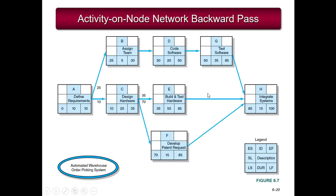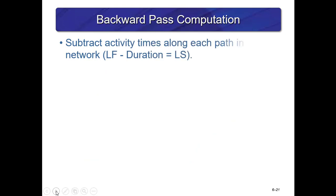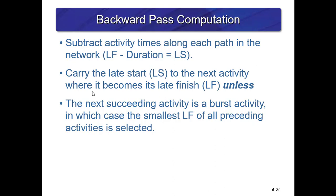The backward pass: hiding the early start and early finish data, when we reach the end of the project we have 100 days or units, and we go backwards subtracting durations along each path until we get back to our early finish of 10. Late finish minus duration equals late start. You carry the late start to the next activity going left, where it becomes the late finish of the preceding activity — unless the next activity is a burst activity, in which case you select the smallest late finish of all preceding activities.